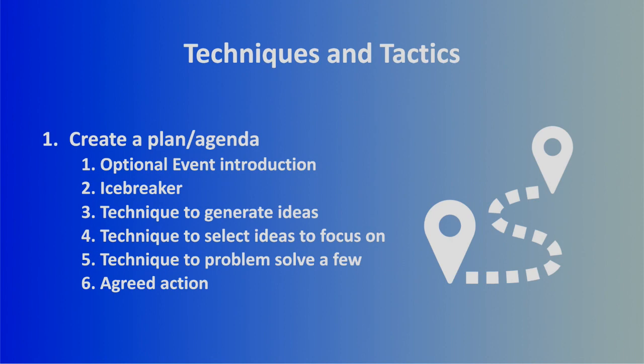Then I like to do an icebreaker, and we'll jump into these other points in more detail in the next slides here, but I like to do icebreakers. Then I like to have a technique to generate ideas. I want to brainstorm and put a whole bunch of ideas on how we could be better out there. And then after that, I want a technique to create some focus, right? We're going to have all these different ideas, and we're not going to try to boil the ocean, but we are going to try to pick a few of those ideas and then focus on those.